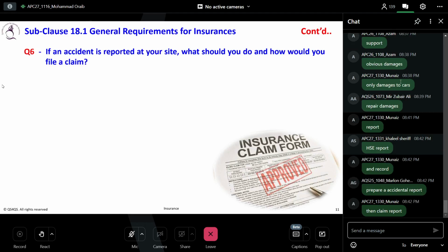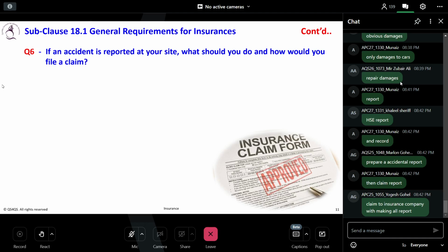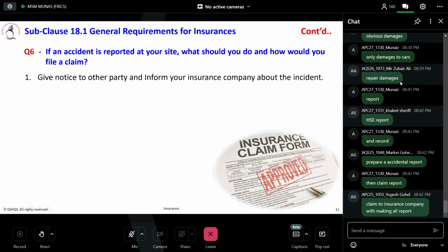they will assign a third party who will come visit on site and assess the damages. And after that, they will assess your claim and comment. And you will agree with them on the final amount, which will be paid. This is usually what you are doing. So if you people never encounter this kind of insurance claim, now this is a procedure.